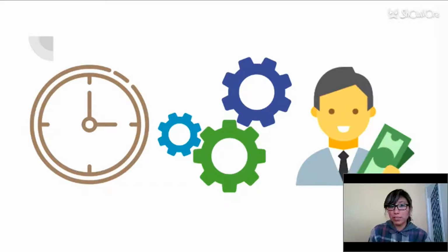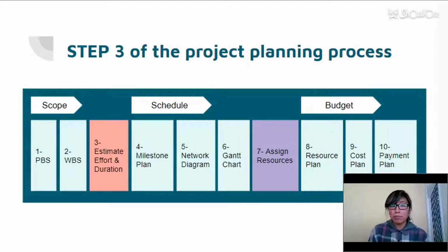This is a critical phase in any project planning because it gives the project team some confidence about the required effort and time to plan ahead for the project. Moreover, this estimate will be used as a foundation to negotiate the project cost. Effort estimation represents the third step of the project planning process. Before we can plan the project schedule, we have to estimate the effort and duration of all the work packages.